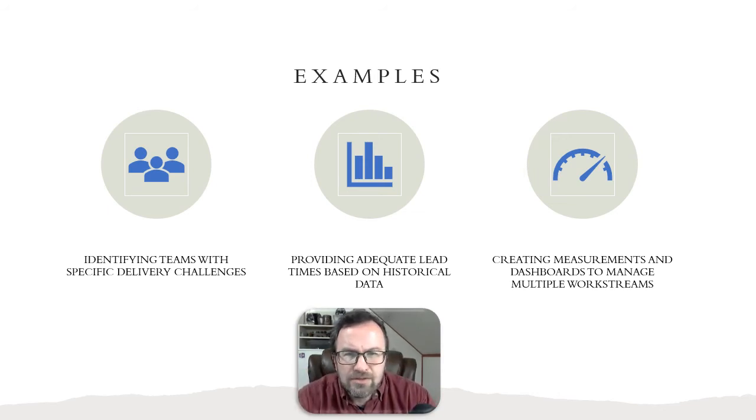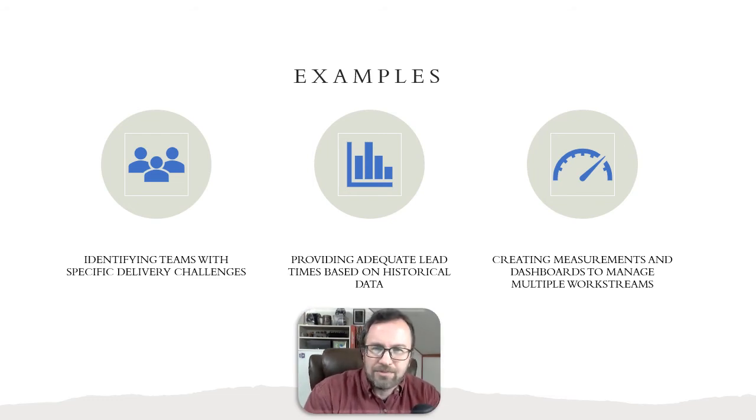It also gives us an opportunity, again, to find adequate lead time. So if we think about this from historical data to improve projects, for example, if we have these stage gates within our process of this project, we're able to then say, okay, I know that consistently this series of steps, for example, functional requirements gathering, takes 14 days.